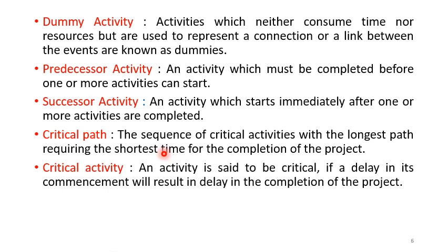One very important point to keep in mind is that a project is completed only when all the activities in the project are completed. So the longest of all the paths from the start of the project to the finish of the project will be your critical path.